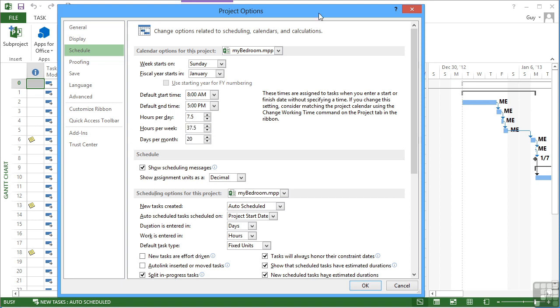So how long is our working month? Well, let's leave the default as 20, which really equates to four weeks in a month, so it's not essentially a calendar month. If you're thinking calendar months when you actually put a duration in, try to convert that more into weeks and days rather than entering Mo for months.